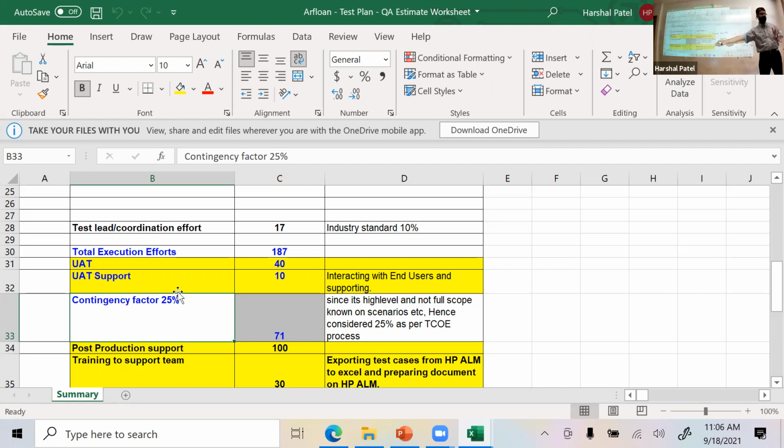Right, so you give the range at that point instead of giving a fixed number. Right, and then as the software starts coming in, you refine the range. And that's how we do estimation in the agile world. Initially, based on experience, we lay it out and say, hey, it's going to take us this many sprints. But as you start coming closer and closer and have more sprints, your window of uncertainty starts going down. So you can narrow it down much more easily.